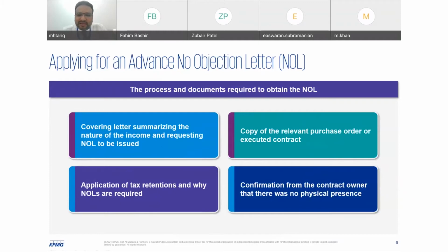Yeah, as I mentioned before, actually this is the obligation of contractors, not contract owner obligation, because contract owner obligation is to retain 5% tax retention, and contractor is required to clear all their tax obligations or tax payments in Kuwait, and then get a TCCO or tax clearance certificate or no objection letter for the release of 5%.